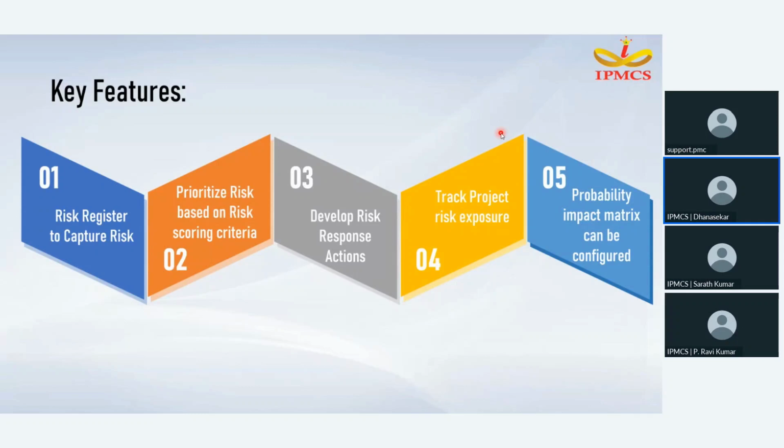So let me discuss one of the risk analysis methodologies and how it is happening in OPC. Impact probability matrices. So what is an impact probability matrix? This matrix specifies combinations of probability and impact that allow individual project risks to be divided into priority groups. The matrix can be made using cardinal scales.